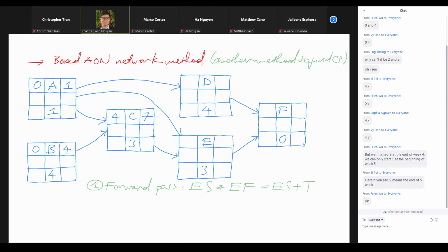Then we're gonna finish C by 7 p.m. Do you see the way to think about the time, the points in time, and the duration, right? So whenever you feel confused or something hard to think about, then please always convert it to the clock time. That's a trick to make it easier for you to keep track of the numbers.